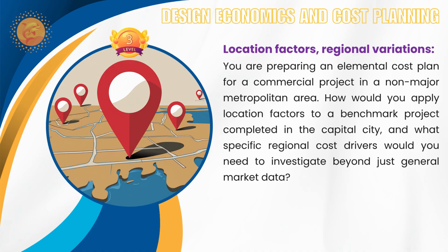Maybe some specific facade installers you want to bring outside the city area may need additional cost, because not only your own labor, you have to consider how it will affect your pricing point. If they are not willing to come, what will be your next option? Those kinds of things we have to consider primarily.